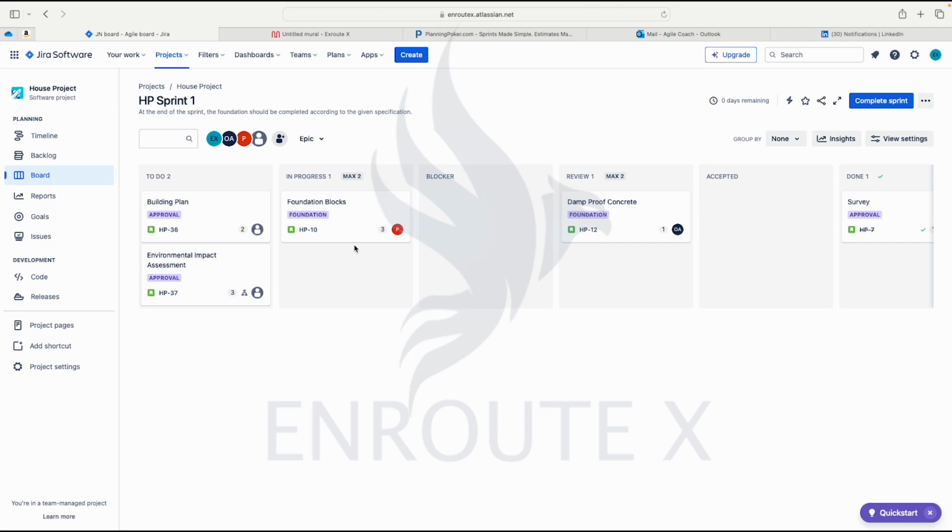Let me step into Kanban a little. There's a process we call work in process limits. It's a practice in Kanban, which is used to restrict, and that is what is here actually on the board, maximum 2, meaning at any time you shouldn't have more than two stories here. What happens when it becomes 3?